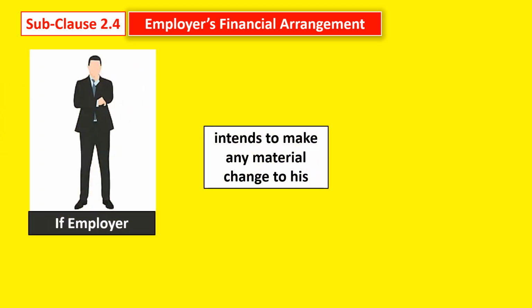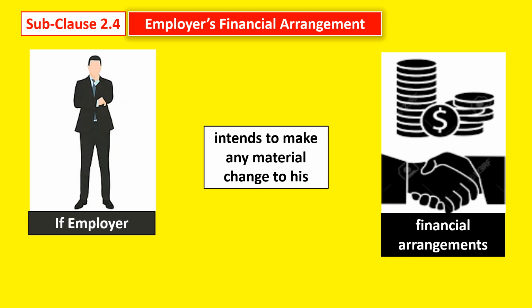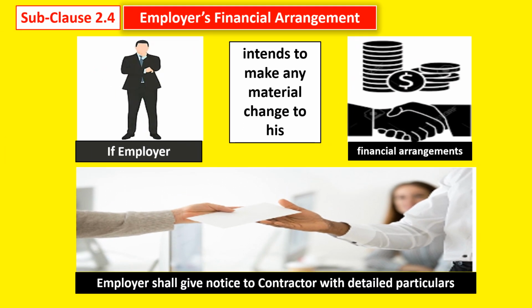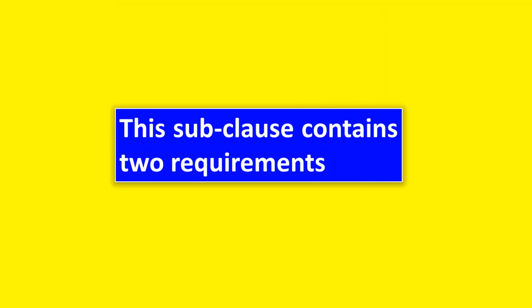If the employer intends to make any material change to his financial arrangements, the employer shall give notice to the contractor with detailed particulars. This subclass contains two requirements.